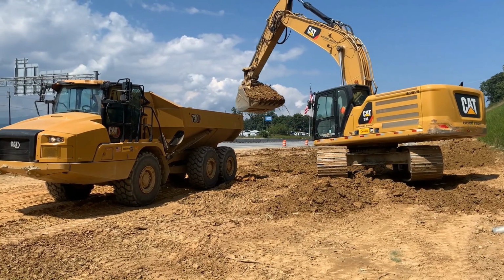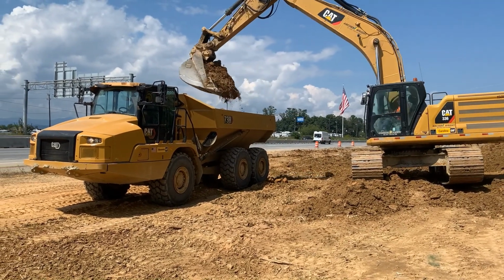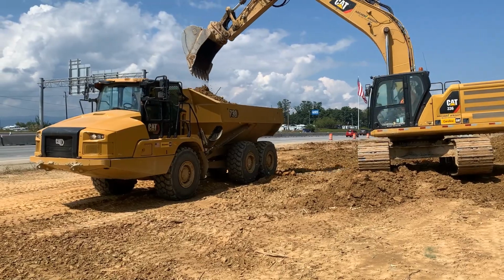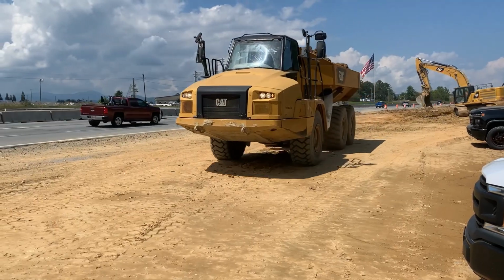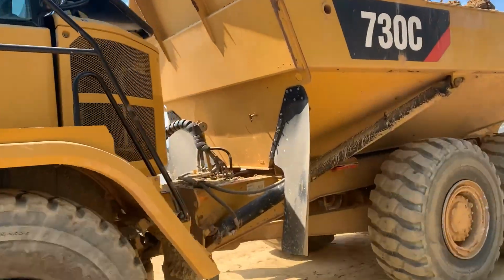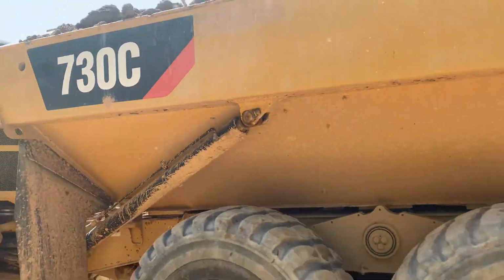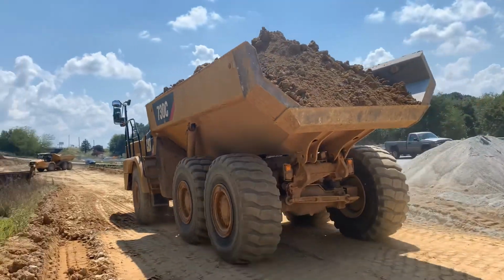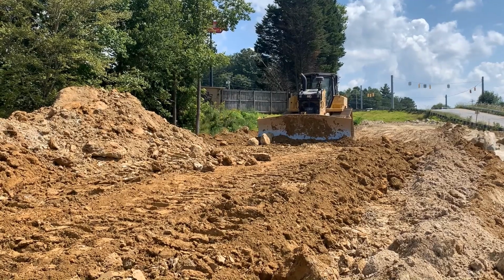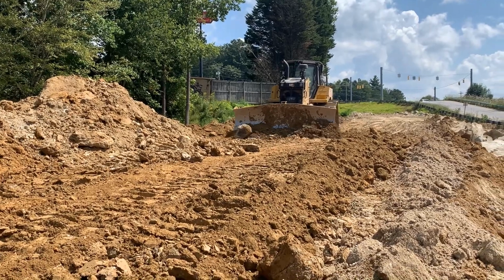Take, for example, this dirt hauling operation on our project. A project engineer should know and track the cost of the 2 operators and the 2 haul truck drivers. They also had to determine if it was worthwhile to use a 3rd haul truck or if 2 was sufficient to achieve max production. Finally, they would work with the crew to develop a method to quantify the work.